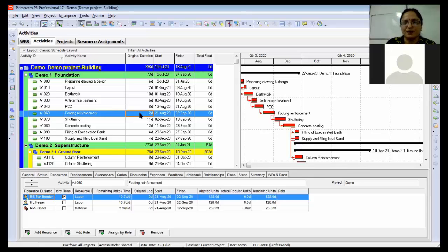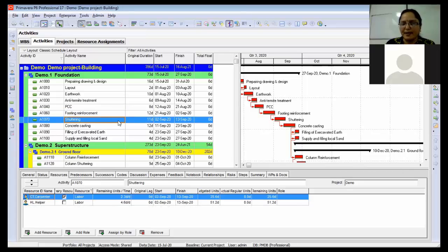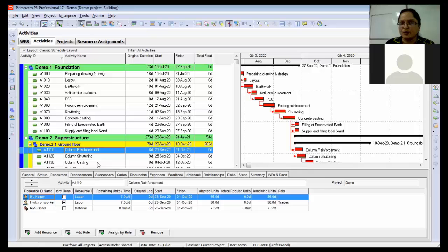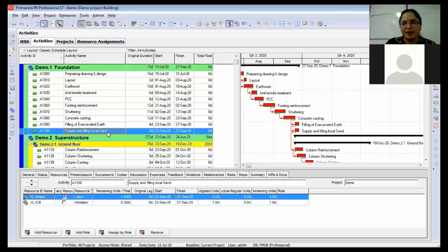So in case you are working for 8 hours a day, 12 hours a day, or 5 hours a day, based on that we can come to know the realistic schedule, right? So once you have developed it, and applied your resources, whichever resource is going to work on which activity, definitely the next step is you have to develop your cost baseline, because whatever cost is there is what we have applied. We have various techniques for cost estimation also, again parametric, analogous or bottom up.